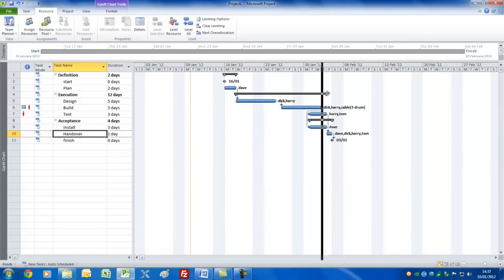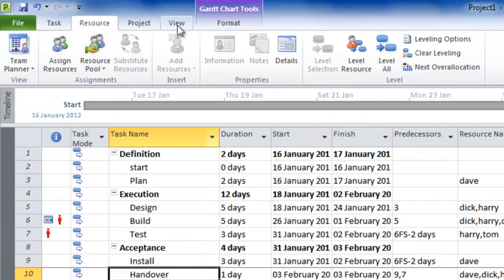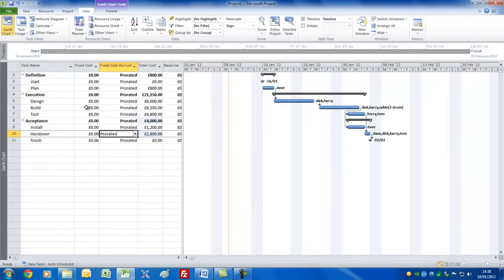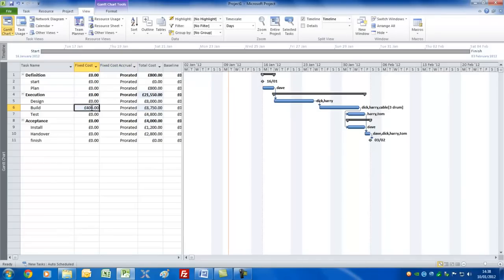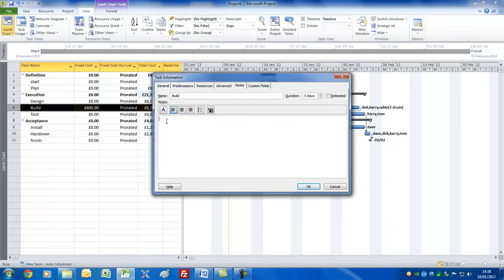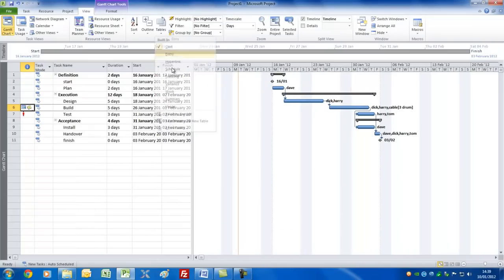This is the Entry table. If we go to View and choose Tables, we'll use the Cost table, simply because it has a Fixed Cost field. For the Build task, in addition to the drum of cable we'll need some other materials. Rather than include those in the resource sheet, we're merely adding it as an expense — let's have £400 as a fixed cost. I'll double-click on this task, go to Notes, and make a note that the £400 is for hotel and travel expenses, just to help remind you what that cost was for in the plan.